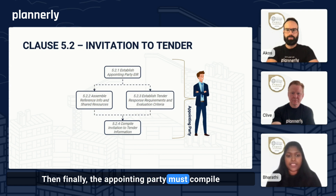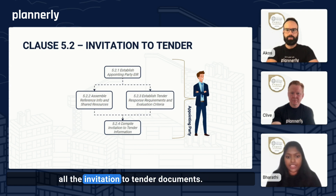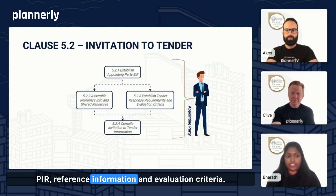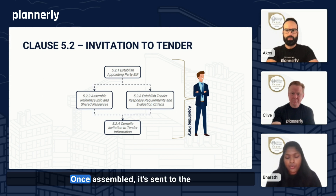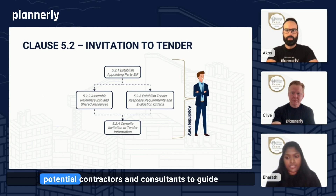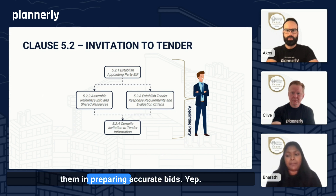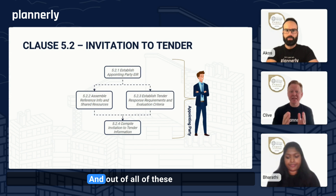Finally, the appointing party must compile all the invitation to tender documents. This package includes the EIR, PIR, reference information, and evaluation criteria. Once assembled, it's sent to the potential contractors and consultants to guide them in preparing accurate bids.